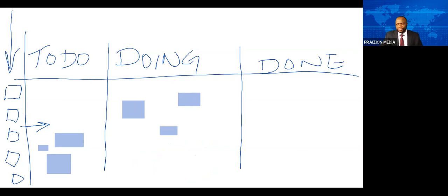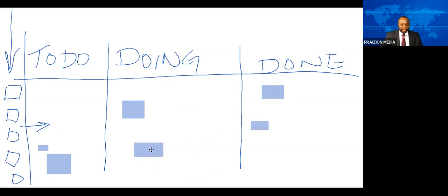So every team has their WIP. If you're doing this as an individual, you've got your WIP. Now you might say, well, I'm going to have 3 because I'm waiting on a deliverable, excuse me, from someone else. But ultimately, as you begin to get things done, you move them into the done column. And then more things are introduced into the pipeline. And that's how the Kanban board works at a high level.